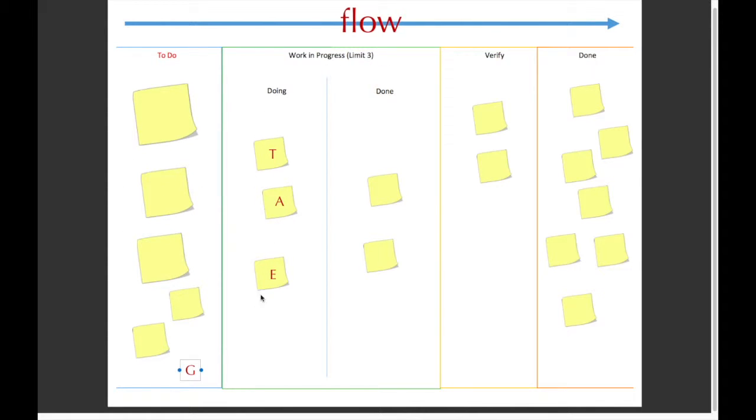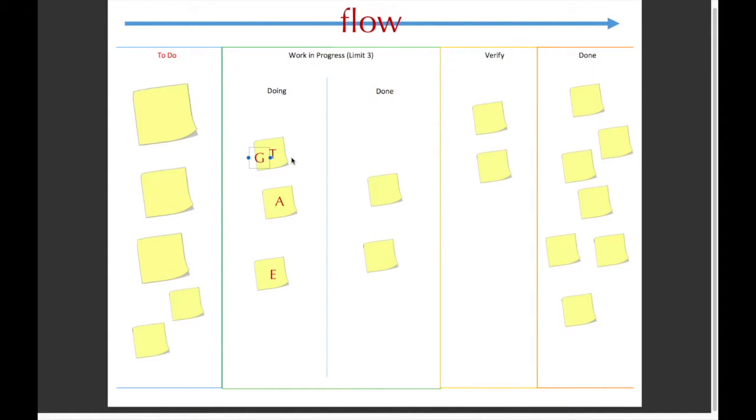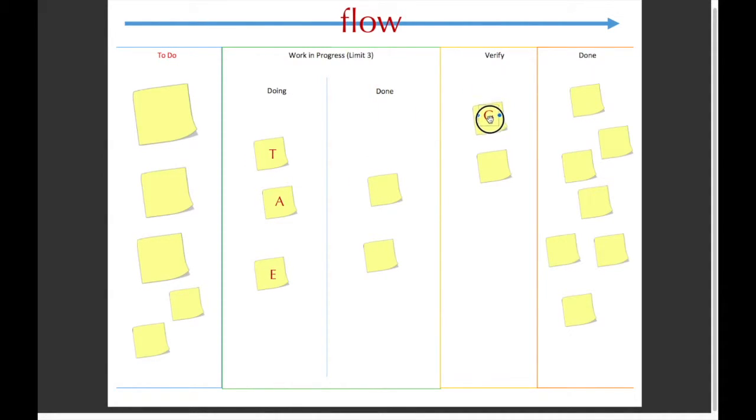But G can come over here and help T take on his task, or if T has completed his task and moved his sticky note to the sign, that means his task needs to be verified. So G can take T's task here and move it to the verifying, letting people know that he's currently verifying the task.